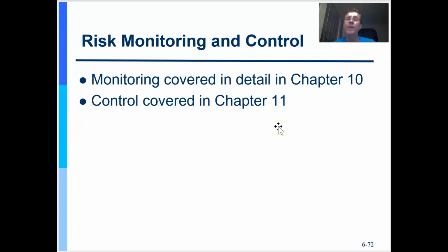Well, I might get a forecast two weeks out that says a tropical storm has formed. Then a week out, I might get a path that shows it coming across my construction area. These are triggers that we want to watch out for.